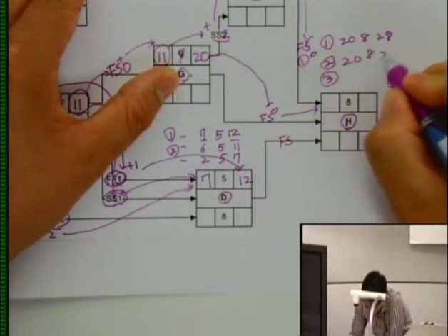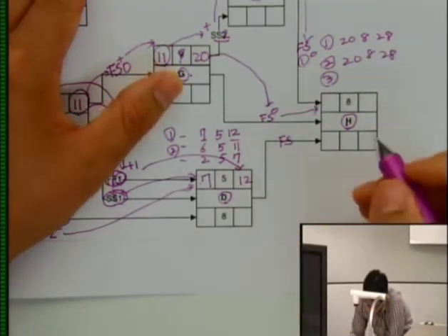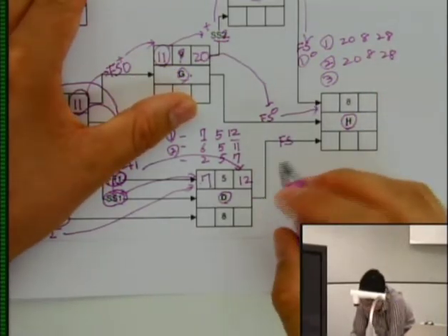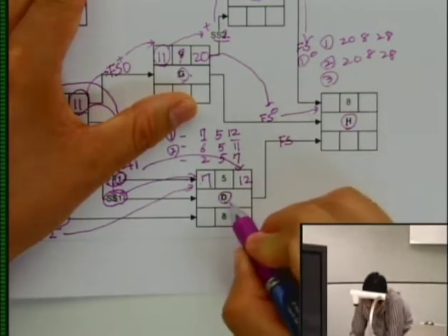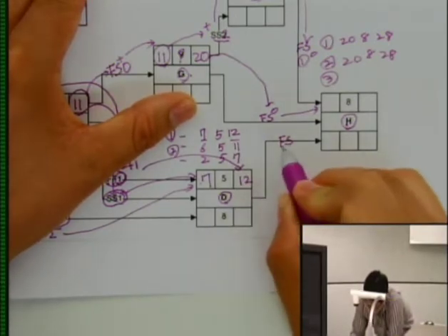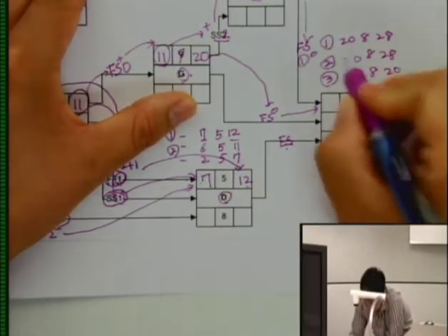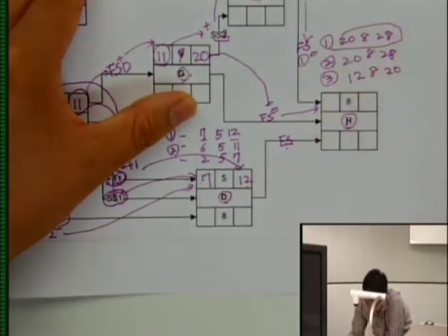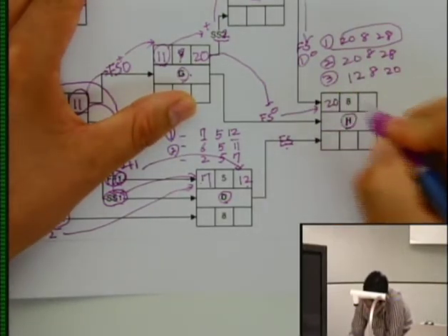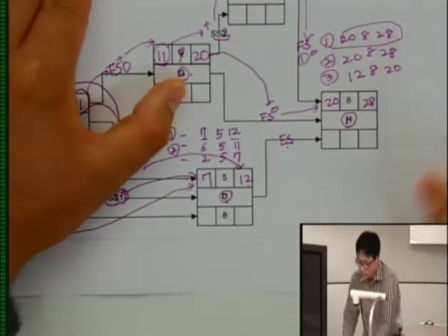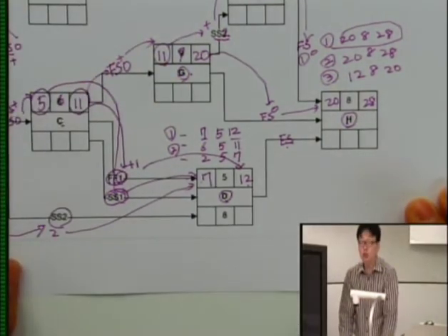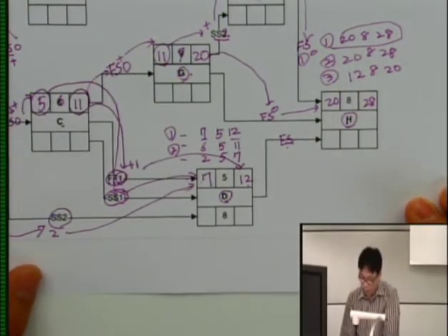So 8, 28. The final one will be the relationship with activity D, which will be finish to start. So 12 plus 0 will be what? 12, 8, 20. So you have to choose option number 1 or 2. So 20, 28. So you just finish your forward path calculation.